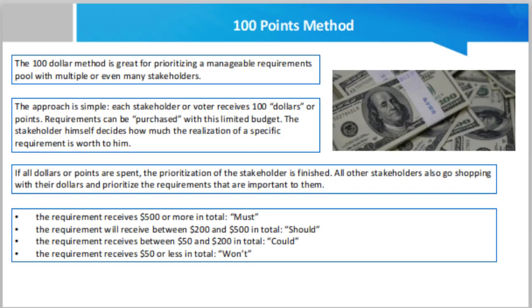The votes do not need to be distributed equally. Rather, a weighted distribution can be allocated to reflect the higher priority that some items are worth. On completion of the voting process, prioritization is determined by calculating the total points allocated to each user story. Now, friend, like we have already discussed, that is how it works. The 100-point method lets participants distribute the 100 points to prioritize different items. The ratings are shown in percentage with the most popular choice ranked from the top. In that way you can rank them and calculate the 100 points.